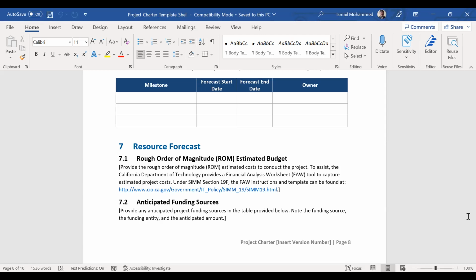And then during iteration one, a customer came up and added more requirements. So you take the requirements and put them into iteration two, since my iteration one is fixed and I have to deliver iteration one on so and so date. You put that into iteration two. And then you calculate the effort, present that effort, and get the approval.